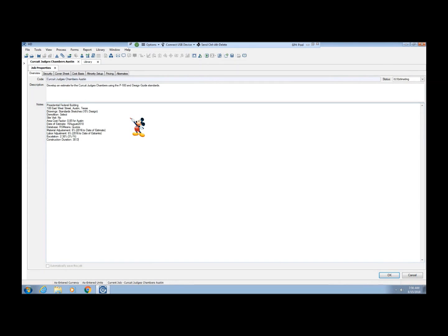We'll put in productivity. In this particular one, I'm putting 85%. We also know what the Prime's job office overhead is. Call that JOOH. We put in what home office overhead is. We'll put HOOH. We'll put in contractor's profit. Generally, we use a weighted guideline to come up with that. But we'll note it here. The bond and insurance, we'll put a note on there.